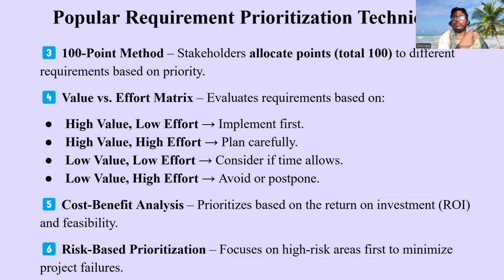Then, as a business analyst or as a stakeholder, you will keep how confident you are in the confidence column, and you'll be multiplying reach into impact into confidence, divided by effort. Effort is what is taken to complete that requirement.